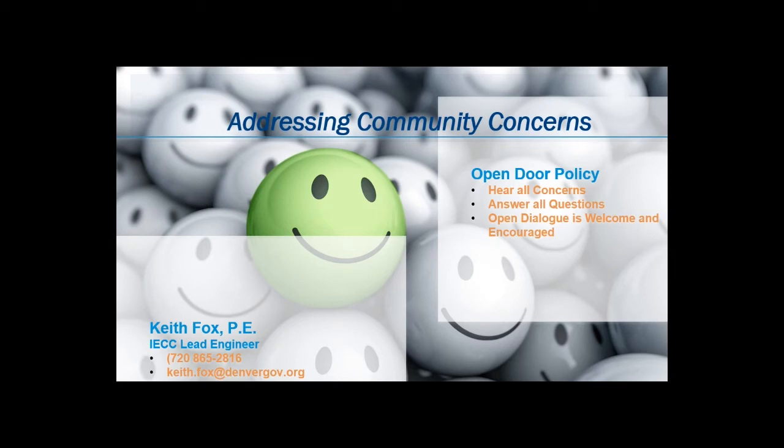Keith, another question for you. What is the specific date for projects being submitted in and after January to comply with these checklists? Starting January 4th, all projects will be required to submit the checklist with their submittal. The intake team will put the project on hold and will not accept it for intake until this document is provided.